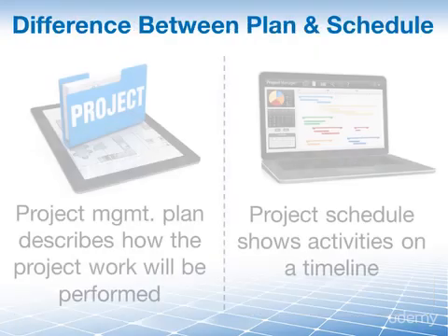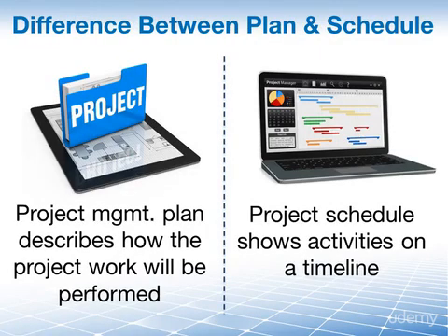We have seen this slide here in previous lessons, and I wanted to bring it up quickly just to remind you that the project management plan is not the same as your project schedule. Your project management plan describes how the work will be performed, and the project schedule shows your activities on a timeline.